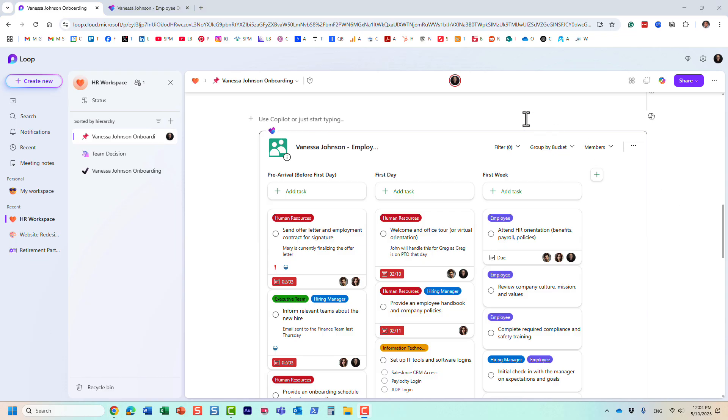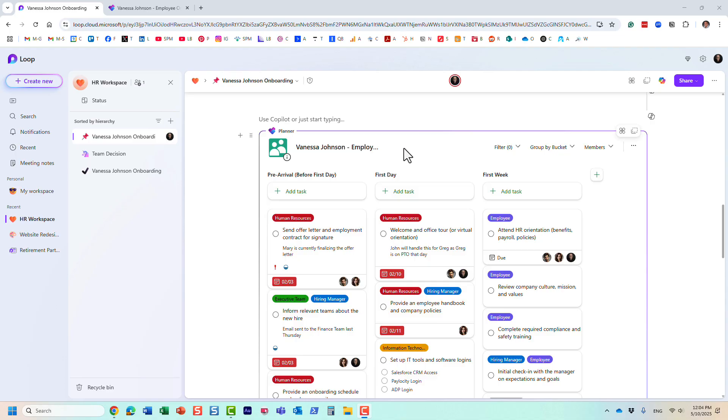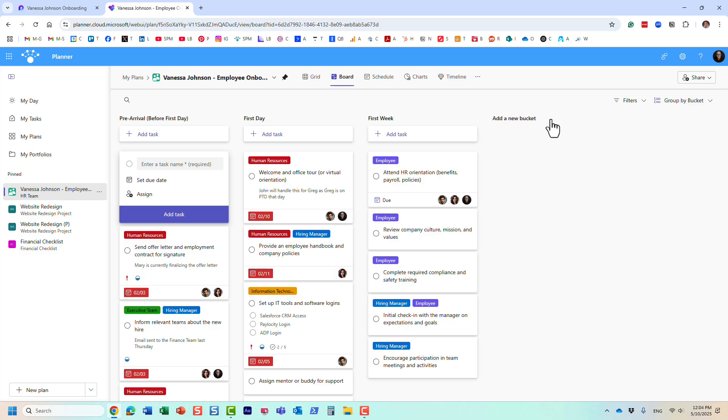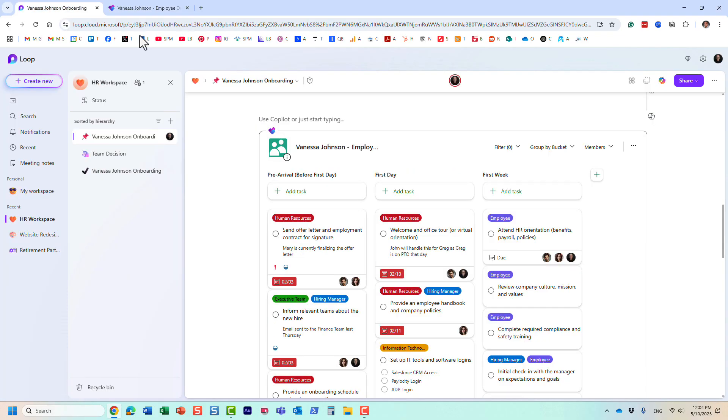Just a couple important nuances about this. First of all, the security of this plan is bound by the security you have set in Planner. Let's say your plan belongs to a particular Microsoft 365 group and only certain members are part of the group. Whoever has access to this plan as a result of your Microsoft 365 group membership, those are the only people who will have access to this plan.